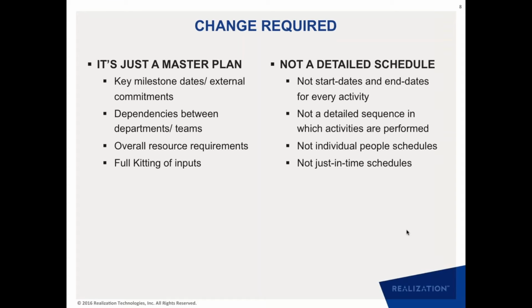And similarly, as far as the inputs are concerned, the trap you can again fall into is saying that since we have a detailed project plan, we can manage the inputs on a just-in-time basis. But the reality is that just-in-time is a mirage, because sometimes when you need those inputs can change, and sometimes the inputs themselves are delayed. So instead of trying to manage every input just-in-time, you should be managing certain full kitting points for these inputs, and the project plan is good for managing those full kit points, not the detailed schedule of every input.